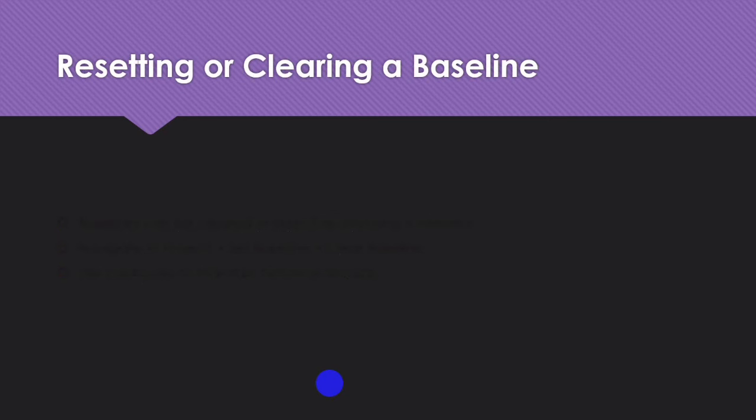Sometimes plans change. You might need to rebaseline your project due to approved changes. In that case, you go to the set baseline menu and choose clear baseline if necessary, but be cautious always, because you have to avoid deleting the original baselines unless absolutely necessary.